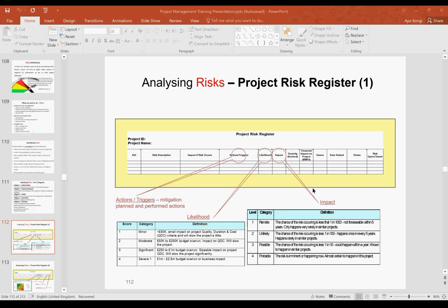If you have medium probability and medium impact, severity will be medium as well. If you have medium likelihood and high impact, severity will be the impact. You always take the one that is higher as severity. Does that make any sense?